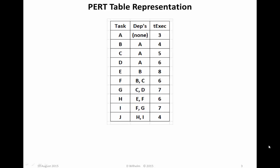Here is a typical PERT table representation of a project. Across the top, the column identifiers are the task identity, the tasks on which each task depends on, in other words the ones that have to be done previously, and the execution time of each task, tExec. The row identifiers down the left are the tasks of the project under the task column heading. In this case, there are ten tasks, A through J.